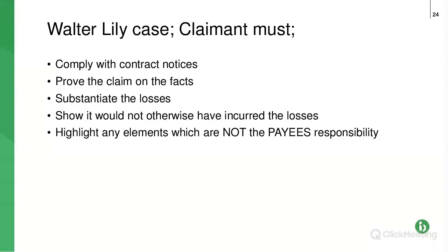So you've told them in some minutes, in a meeting, and it's been recorded in the minutes, or you've told them in your weekly progress report, or it's been discussed, or the employer has told you, for example, I've got one at the moment, don't work on this bit of the site, don't worry about delay, we will sort that out at the end of the project. So they're acknowledging, they know, so they've given themselves notice, they know that the contract is going to be delayed.